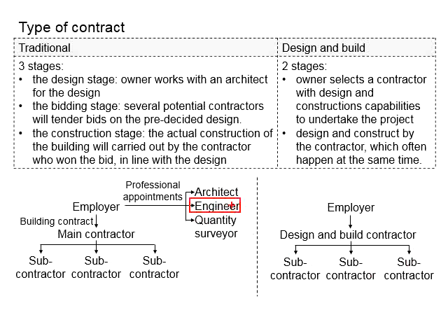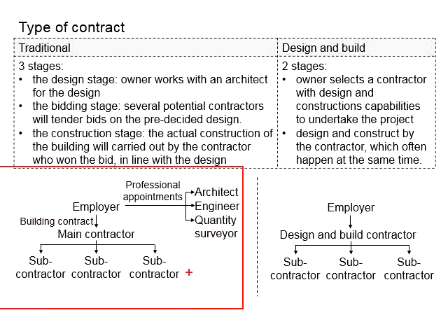Engineers will give the technical advice and supervision to the construction works done by the main contractors as well as the subcontractors. And the quantity surveyor will deal with the claims in terms of the materials as well as the work done by the contractors. All the parties need to work together in order to ensure the success of the traditional construction project.